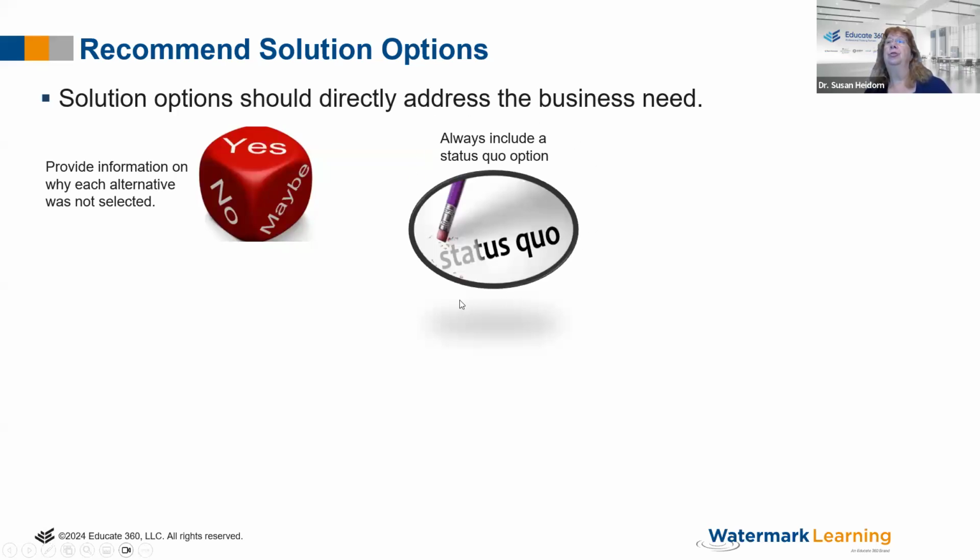When you create your solutions, you can always say do nothing or keep the status quo. It's always an option, but it is a cost. There's a cost to keeping the same thing that you're doing, and there is a big risk. Kind of the definition of insanity.